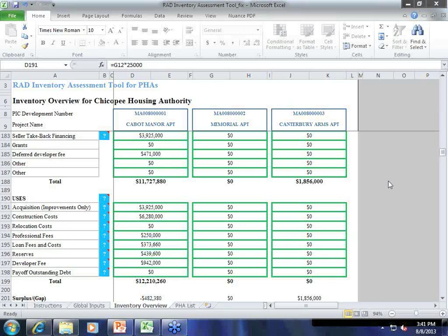Okay. Once you submit your application, is there an actual approval letter that you'll get that says that your application has been accepted? And if so, what's the turnaround time on that? Yeah, so when you submit your application to RAD applications at HUD.gov, first you'll get an automatic reply that says, thanks, we've received it. And then our review team performs its review, and it's typically within 30 days. We approve your application and provide you a CHAP. Okay, thank you.